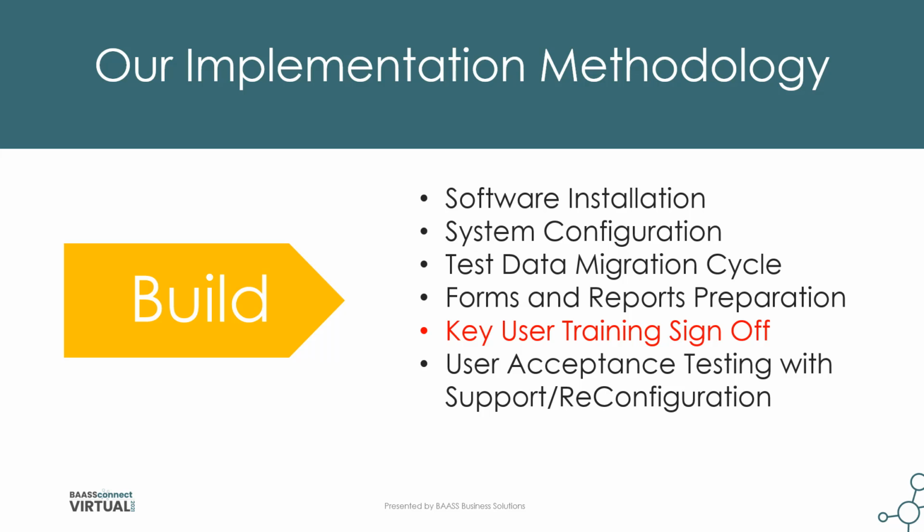Our next phase is the build phase, and this is the major part of the project. At this time, this is when we kick off the software installation, we begin the system configuration, we import the data migration that has been provided from the workshop. We begin the forms and reports preparation. We have key user training, and at the same time, this is also a milestone for sign-off.